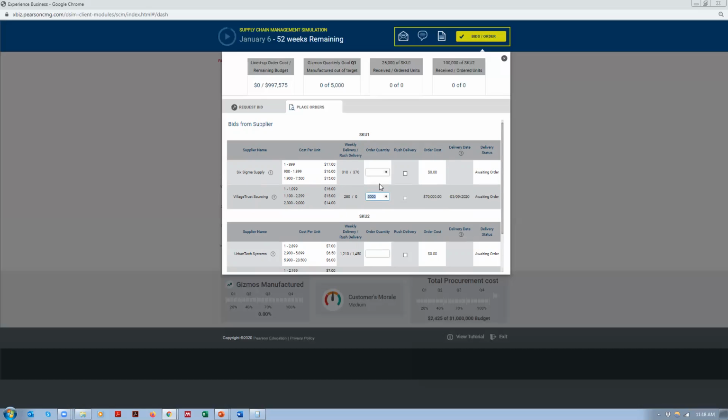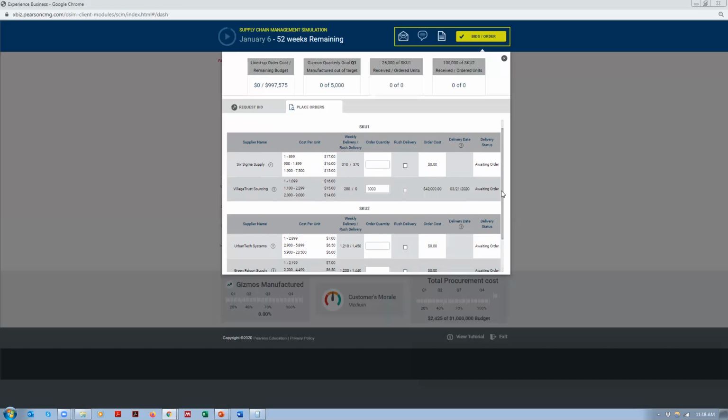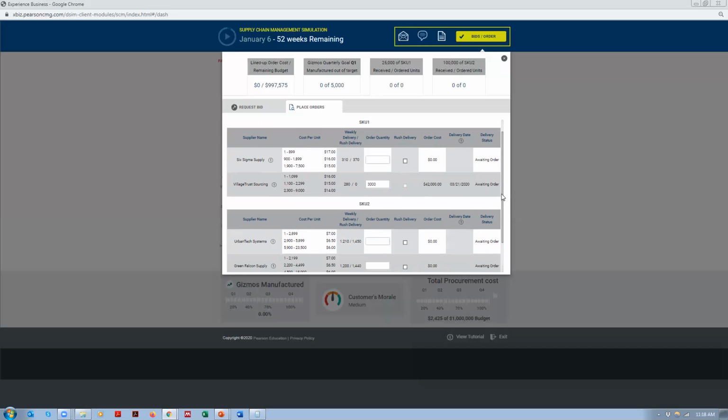So you can either place an order of 5,000 with this one, or you can say, I'll just place an order of 3,000 with this one right now, and I'll wait for other quotations. If there is a lower quotation, I'll place an order. If not, I'll place the rest. Right now you've only placed an order of 3,000. These 3,000 will be delivered on 21st of March, which is still tight, but let's see.